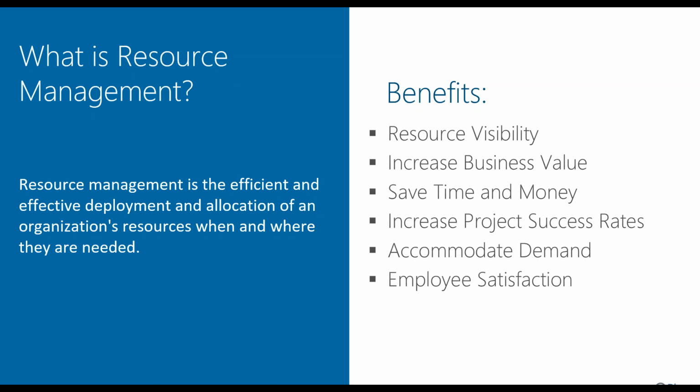If we are more ad hoc in our resource management and we don't take a holistic approach, we tend to over-allocate, use, and I would say even many times abuse our resources with unrealistic workloads and unrealistic demands and commitments. Employee satisfaction there can be impacted in that they could be frustrated and confused, and morale can actually dip if we don't get a handle on this, and ultimately, in the worst case, can lead to high turnover. So these are benefits that tackling resource management as a discipline can have for an organization if we do this